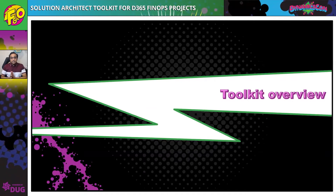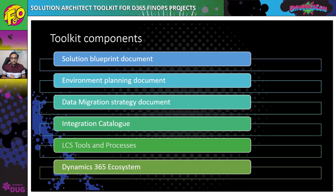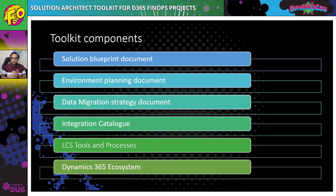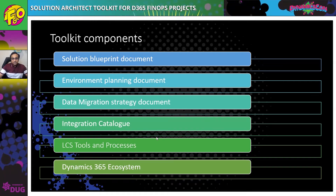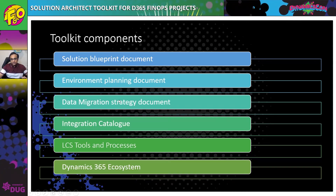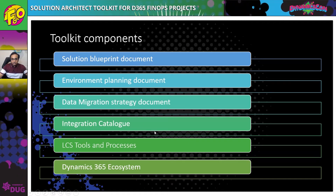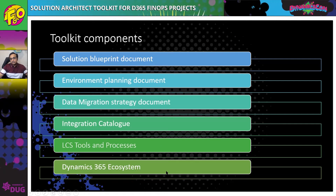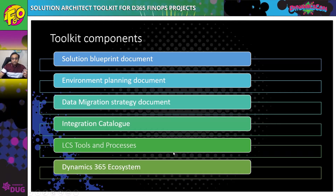Let's look at what the toolkit components are. We are listing some documents, checklists, and templates which a solution architect should keep handy, as these are required in every project and can be asked for at any time. The key documents — and this is not a complete list — include the solution blueprint document, environment planning document, data migration strategy, integration catalog, and an understanding of LCS tools and processes and the wider Dynamics ecosystem.